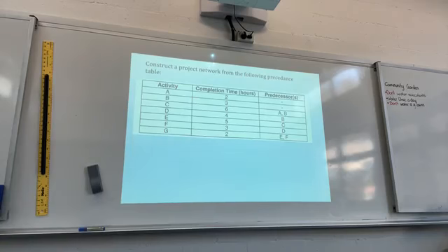If you look at this network here, you can see that the immediate predecessor for C is A and B, whereas the immediate predecessor for D is only B. That will pose a little bit of a problem. Agree? You cannot label two lines with the same thing. That's correct. Therefore, you need a dummy activity. All right, let me quickly show you.